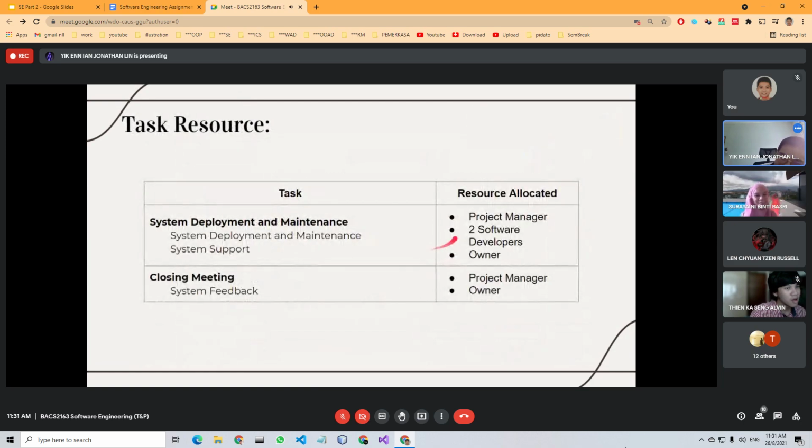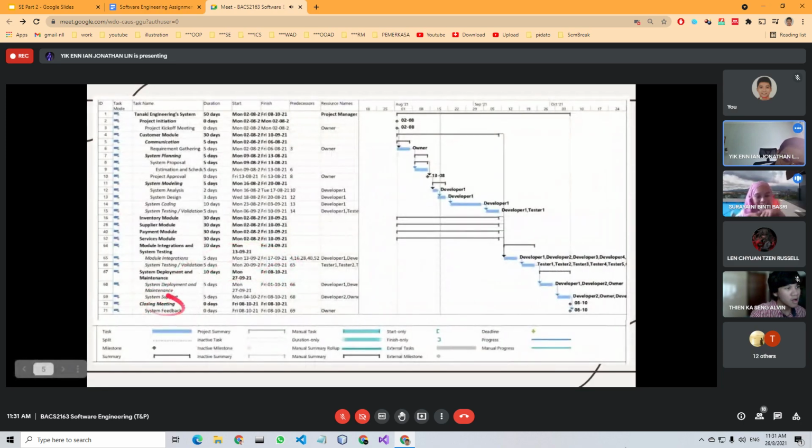Okay. So only this part, only for this first. Only the maintenance part needs some shifting. Because later when you are developing the system, you already have the budget. So you need to assign all of your resources based on the constraint of your budget. Like I said just now, before you receive the project, you already know your client's budget.